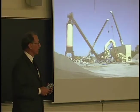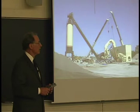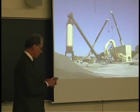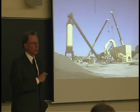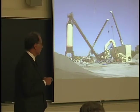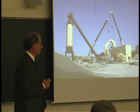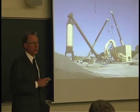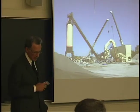It was so big that we bid it joint venture with another contractor. They bought a brand new asphalt plant, and they put it on the east end of the job over by Marshall. We bought one, put it on the west end of the job in the area of Casey, and then we had a third asphalt plant at Greenup, and we ran some mix out of there also.